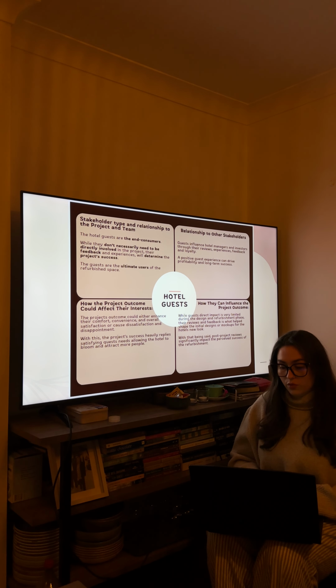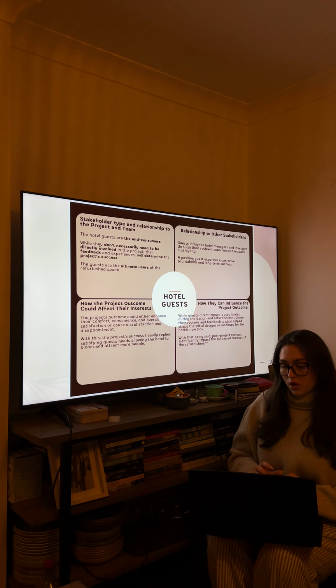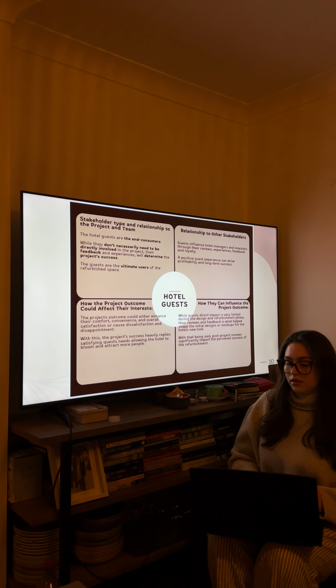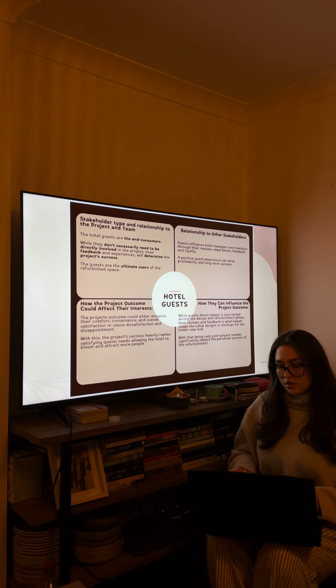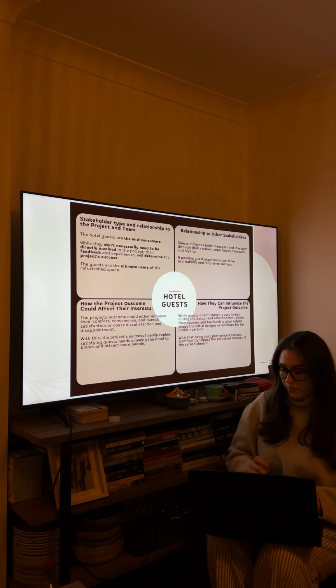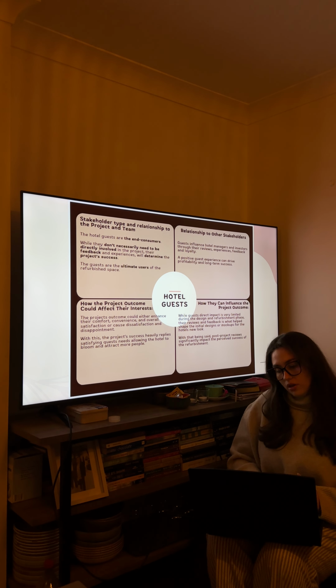And our final stakeholder will be the end user, which is the hotel guest. While they're not directly involved with the whole development project, the building process, nor the design process, they are represented as the end users whose satisfaction does determine the project success. So their expectations will include comfort, convenience, and very unique experiences. When it comes to communication and collaboration strategies, conducting market research during the development process will help us understand what guests are looking for and their preferences. So incorporating feedback from similar projects will provide guidance in order to help decision making that will enhance their satisfaction with the final project. Their impact on the stakeholders' decision making is not during the whole development process, but failing to anticipate their needs can result in a design that does not meet market demands and will affect the long term profitability of the hotel.